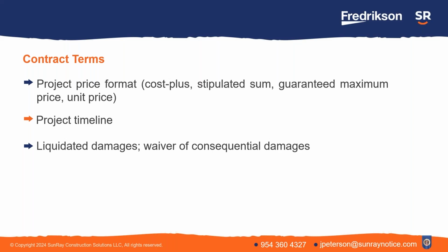The second thing is consequential damages. Consequential damages is the lawyerly phrase for delay damages, the damages you cause if your work is delayed for any reason and you don't get the project done by the specified timeline. That's the name that lawyers give those damages. Those can be waived in Minnesota. And most construction firms, when they contract with owners or when subcontractors contract with contractors, are at least in the first instance going to ask that consequential damages be waived.